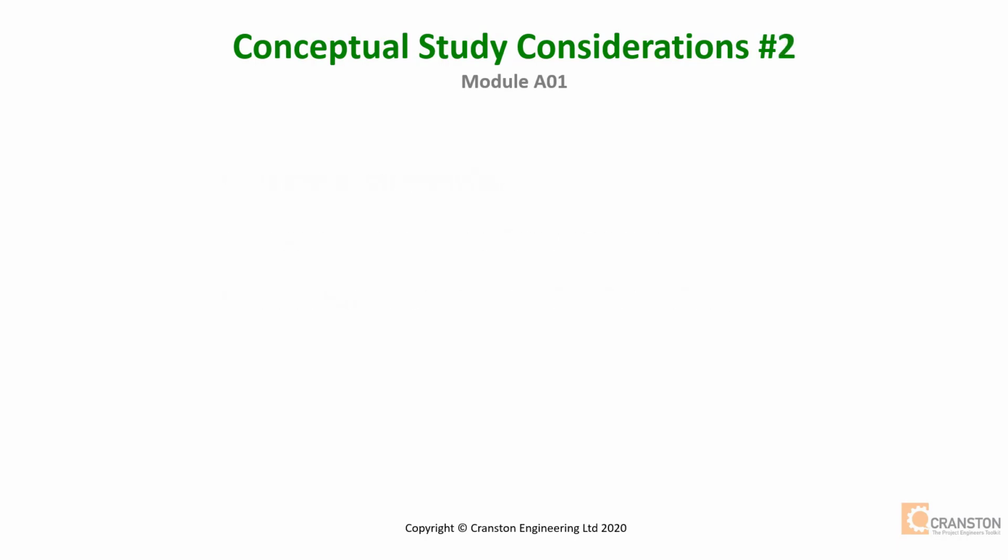Other conceptual study considerations. We need to consider the primary structural capacity. This is fundamental to ensure that the primary structure can withstand the loads that will be imposed from the new accommodation, both during installation and operation.